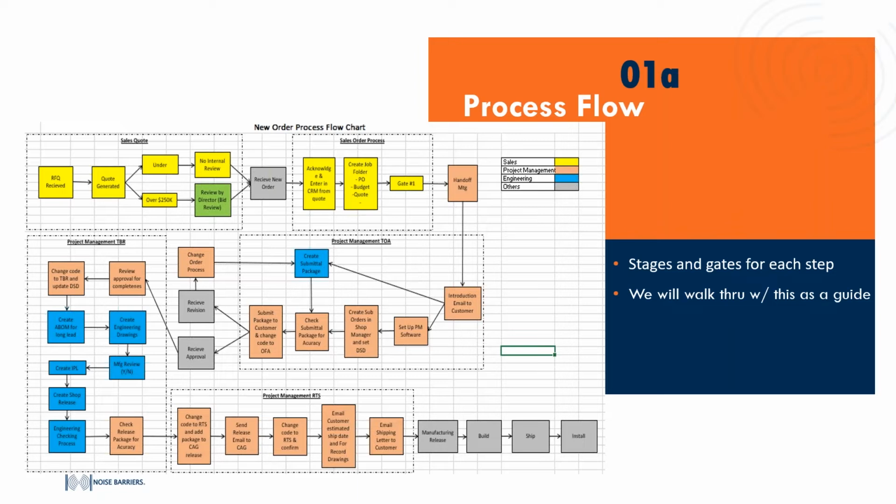And then we have a scope history. Here we have a kind of complicated chart, but it's the life of a door or any product, in this case, a door. From RFQ up here, we're skipping through all of this to when we receive the order. What we'd like to do is immediately acknowledge it within a day or two. We immediately create the folder for the internal team for who's the customer, what's his PO, what's the quote, etc. That gets handed off to our internal engineering, and that includes the project manager. This is where you'd have your project manager assigned.